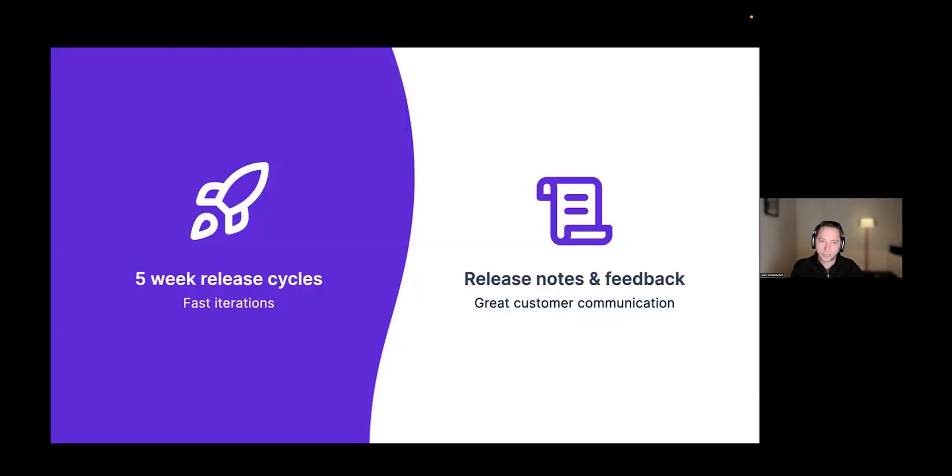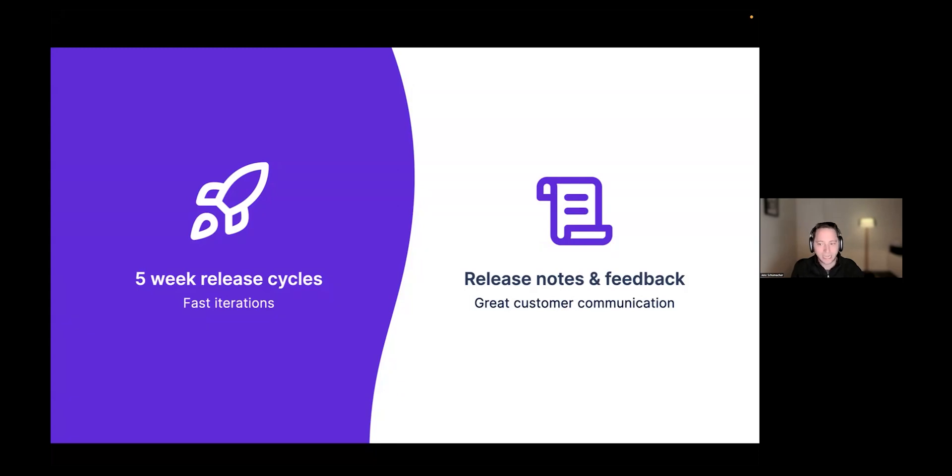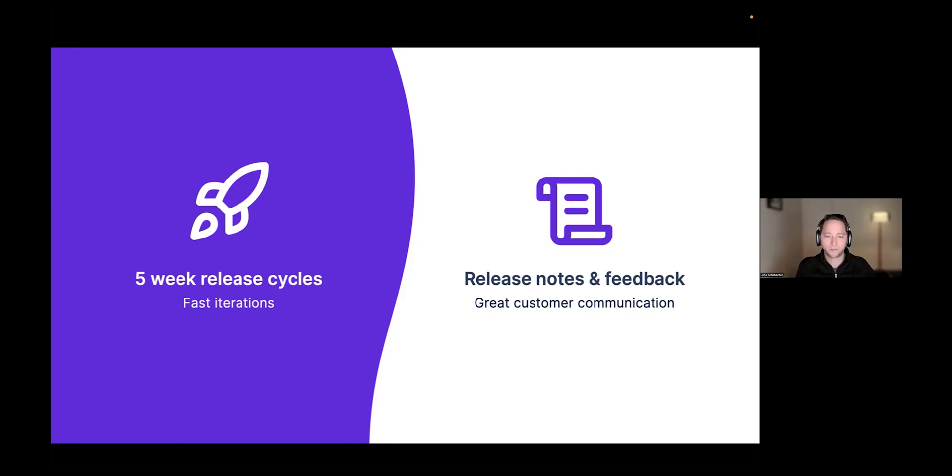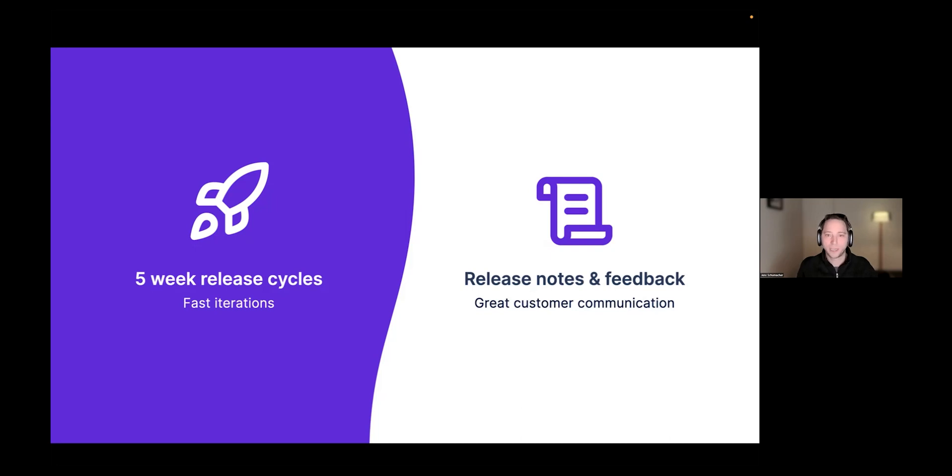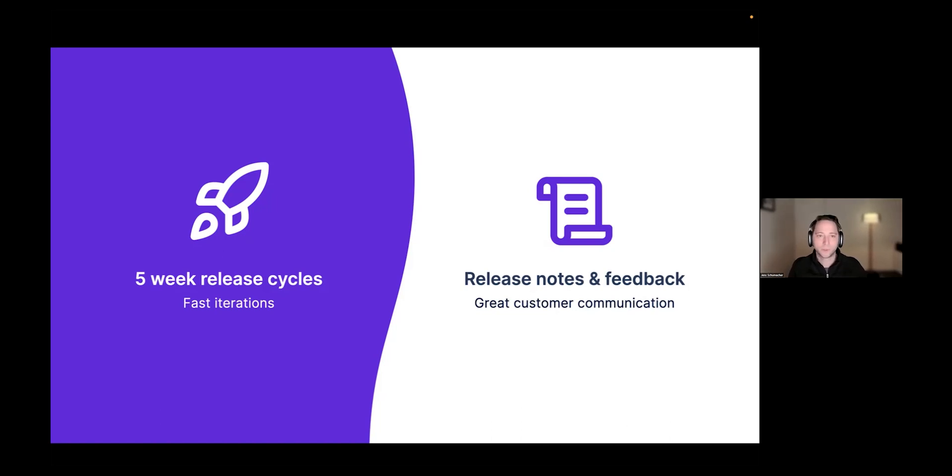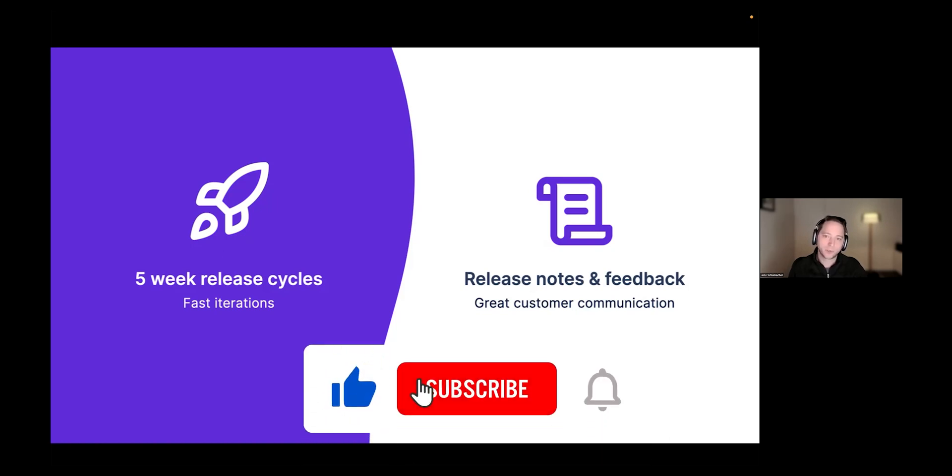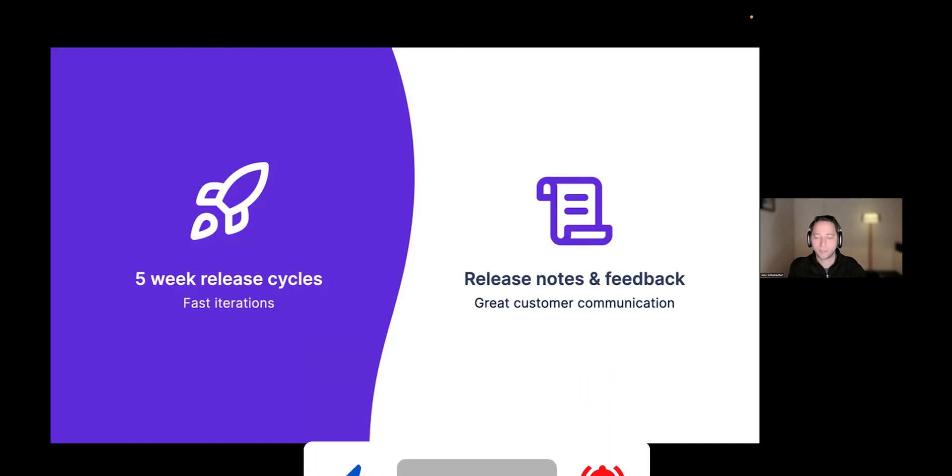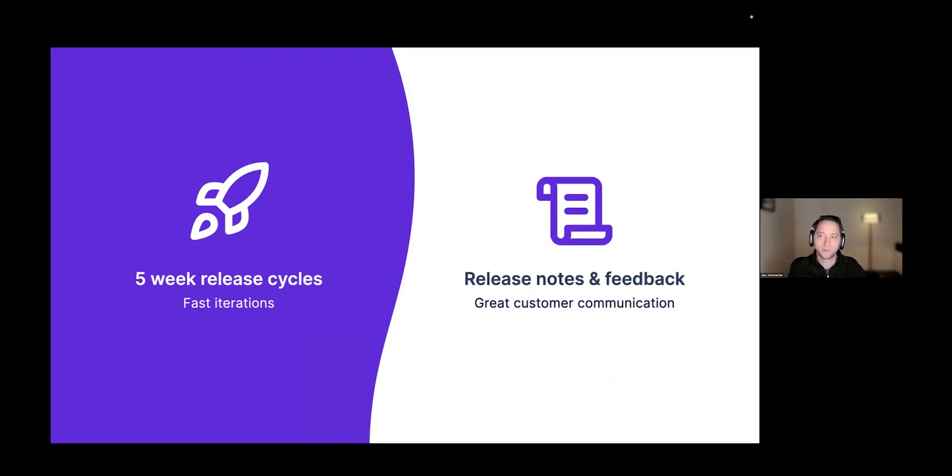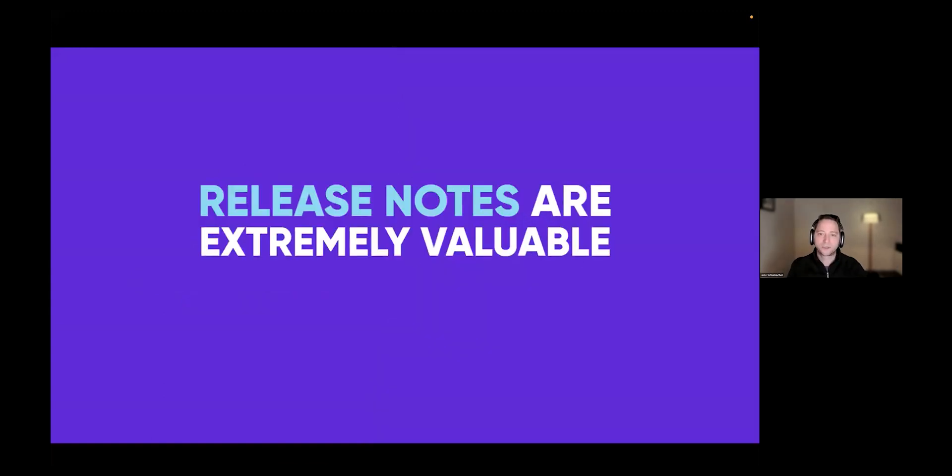We did a combination of fast iterations and great customer communication. With the fast iterations, we introduced five-week release cycles. Today that's normal, you release all the time to the cloud. But back then, our standard release cycle for Confluence and Jira was actually 90 days, three months instead of five weeks. But the second part was listening to the feedback and communicating changes that we make to the product and getting them excited with every single release. We know it worked because more than 80% of the customers upgraded every five weeks to the latest release.